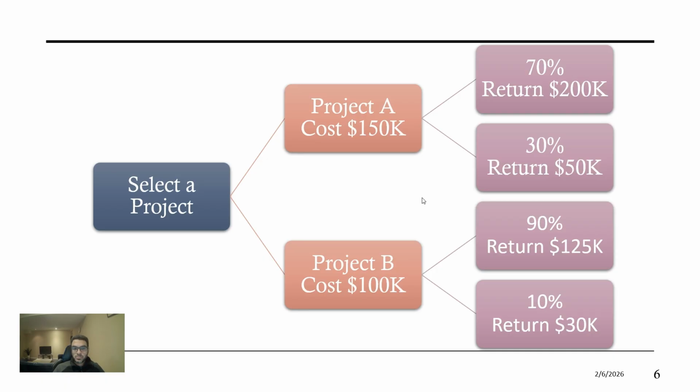What we do is that we put the decision and the possible outcomes on branches. So here we have two paths, two alternatives. For each alternative, we look at the different outcomes. Now, we do the math. The formula is simple. Multiply the probability times the impact. We do that for each outcome.